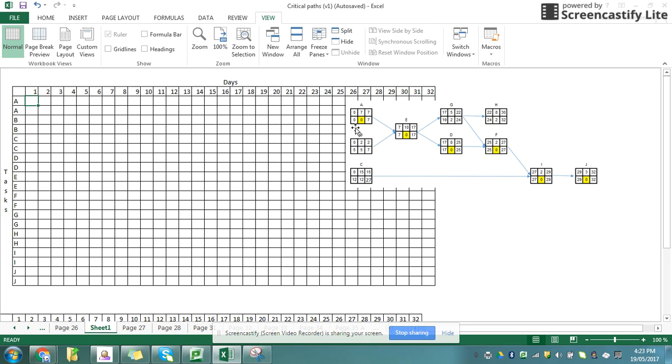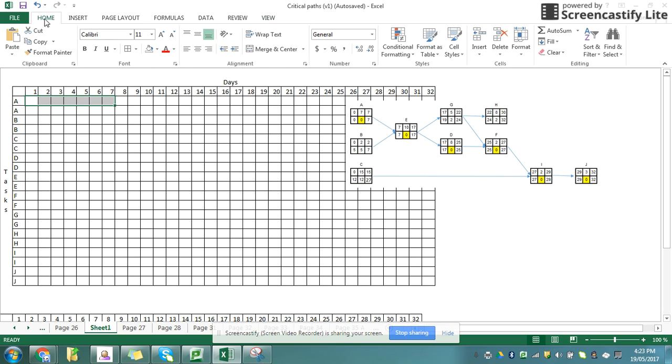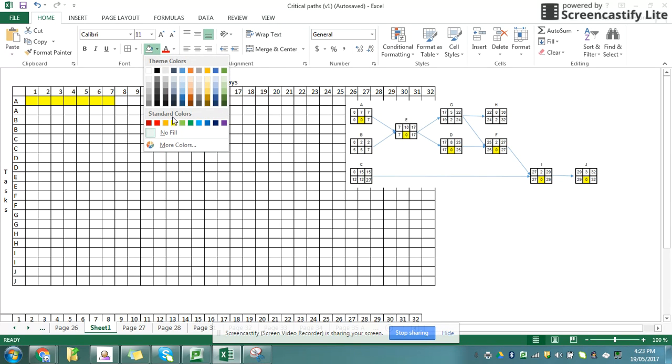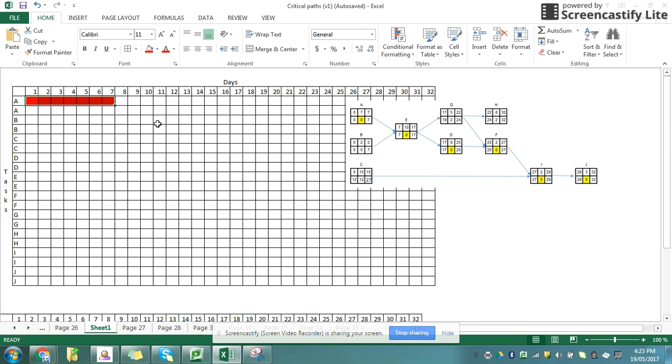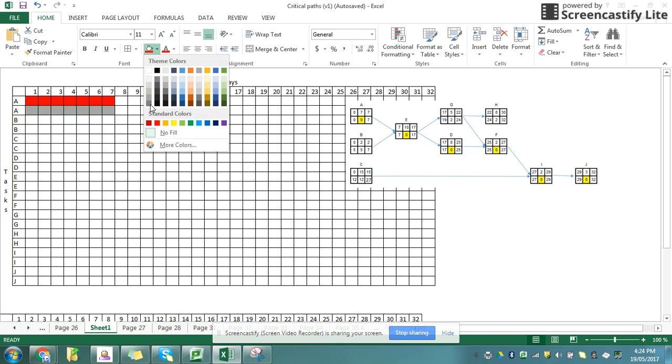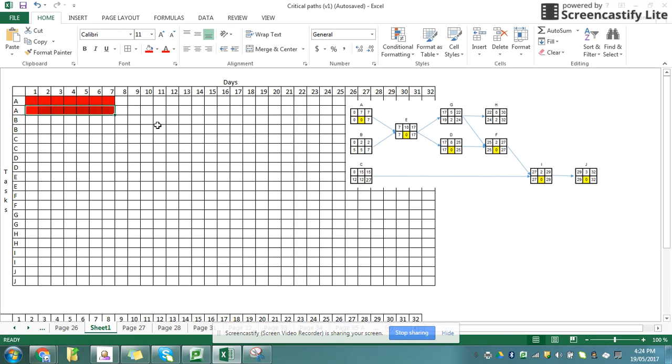So if I look at task A, it starts at 0 and it goes to 7. So what I'm going to do is I'm going to highlight from 0 to 7 and I'm going to color that in. Now I'm going to color that in red because I know it's on my critical path. I'm also going to draw another one to show you that I also draw a line for my latest time, so from 0 to 7.